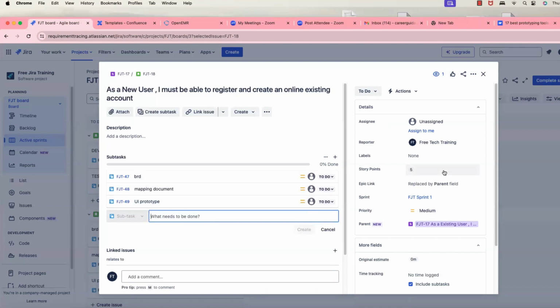I've already told you yesterday that story point estimation is basically, if it's one story point, it's 8 hours. In my project, it's like that. I don't know about other projects. In our project, if it's one story point, we calculate it as 8 hours. So how we do the story point estimation is how long it will take for the developer to develop that, how long it will take for the tester to test that, and also the BA. If you're doing all the coordination, you have to combine all the points, and we recommend giving a maximum of 8, not more than that.